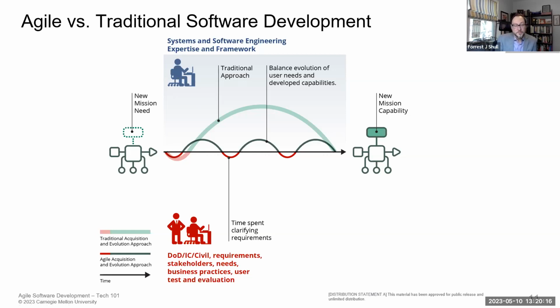What Agile does instead is it makes this a much more tightly constrained and iterative process, okay? So we do, of course, still begin our work by talking to the users, understanding the requirements, but I'm going to take a smaller chunk of the work, okay? Understand what that first chunk is I'm trying to build, go off and build it, and then come back to the users again and put that in front of them. Usually the best way that we have of understanding what the software needs to do is to show successive approximations of it to the customers, so that they understand what that functionality really looks like, and then come up with their own set of refinements about how to make it more useful.